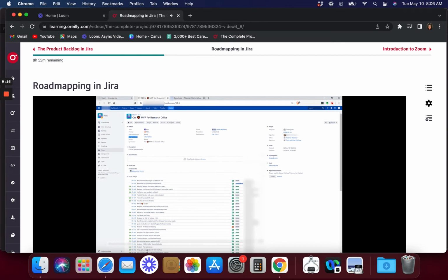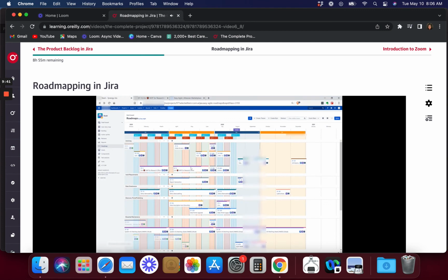Once all of this gets done, we'll be able to mark this big epic complete, meaning after I did all of this, this gets done automatically because all of this is like a child and this is like the parent, right? The epic is the bigger thing; because it's so big you can't do it in a single sprint. Once you complete the user stories that are part of this epic, through your sprints, then automatically the epic is done. It's considered complete, all right?